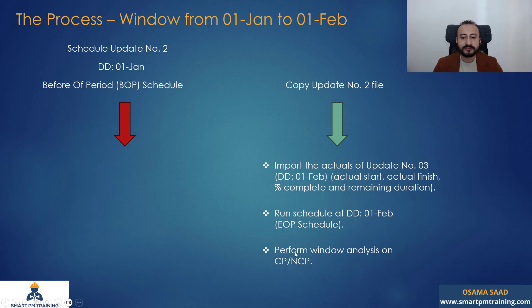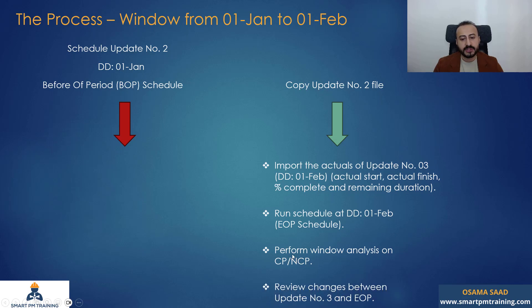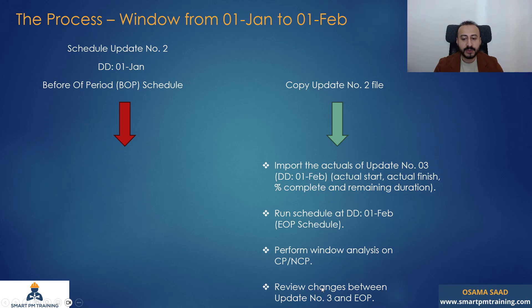Then you're going to follow the same process as 3.3. You will perform window analysis on the critical path activities and the near critical path. You will also review changes between the schedule update itself — number three, the one I took actuals from — and compare it with the end of period. The end of period is the one without any changes.